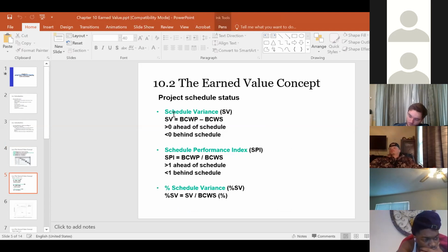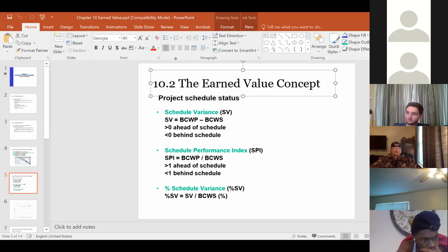One is called SV, schedule variance. Schedule variance is defined as BCWP minus BCWS.